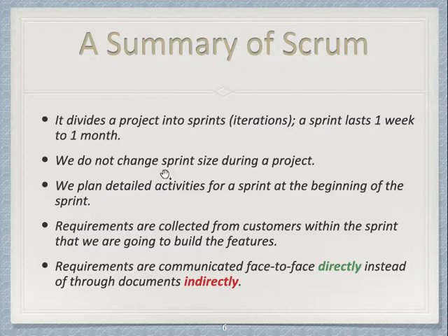For example, suppose you have decided to finish certain tasks within this sprint, and at the end of the sprint, you cannot finish them. What do you do? In waterfall, if at the end of the design phase they cannot finish all the work in the design phase, then they will extend the design phase a few weeks or a few months. But in Scrum, we don't extend. We just end the sprint there, and then we mark the status of those tasks as incomplete. Whatever is unfinished, we would do in the next sprint. So you want to know that, and that's a very easy way to test your understanding in an exam. But of course, it's a very easy, straightforward question.